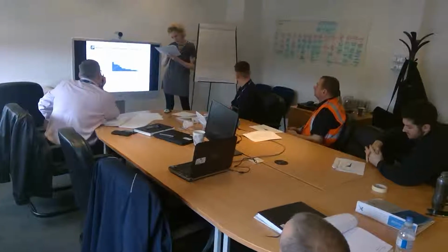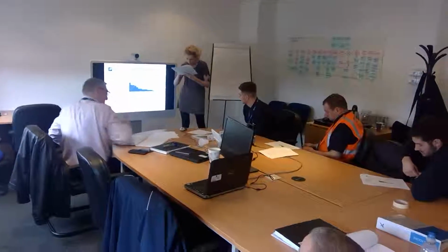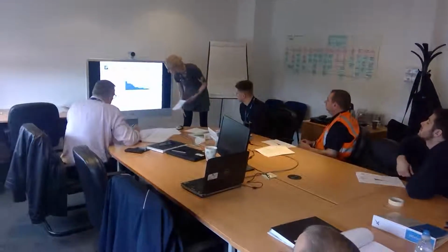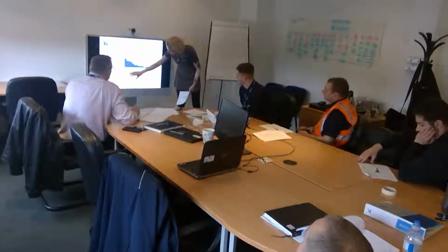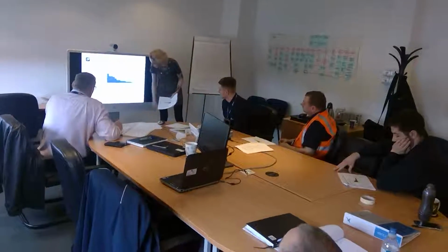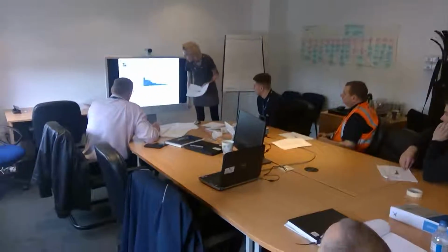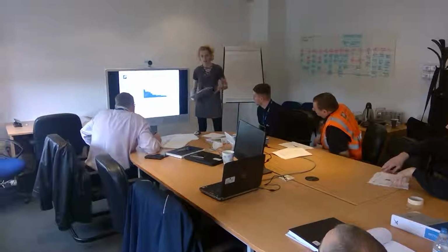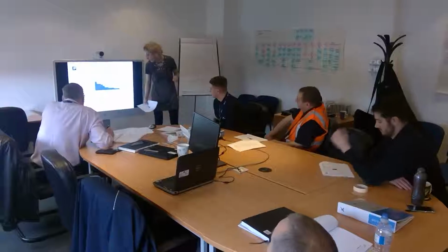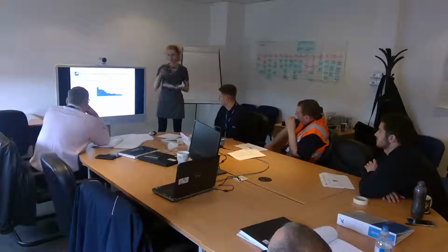Then measurements missing from drawings, materials over ordered, incorrect quantity. That's sort of the worst ones. Your measurements missing and over ordering sort of comes in with the incorrect information. We kind of realised as we went along that a lot of the problems come under that banner, because it's things that are coming up on drawings. If the measurements are missing from the drawings, it can make things wrong. If things aren't right on drawings, we end up doing the takeoffs wrong, ordering the materials wrong, so then things have to be ordered weeks down the line, that delays us further.